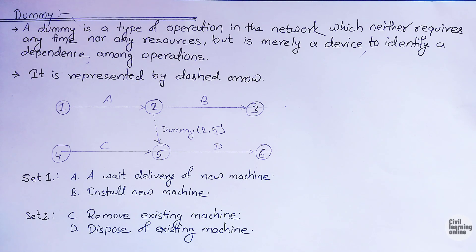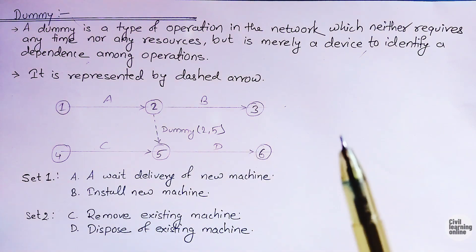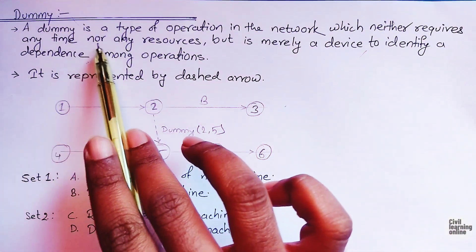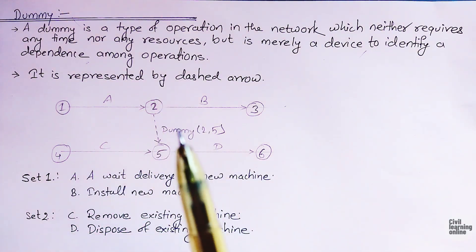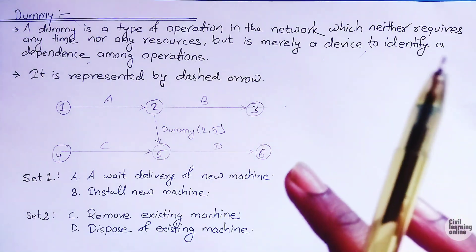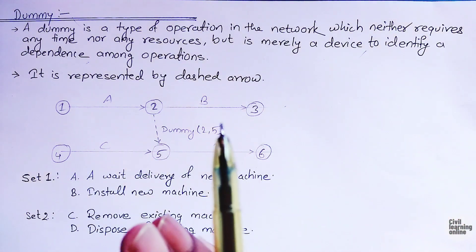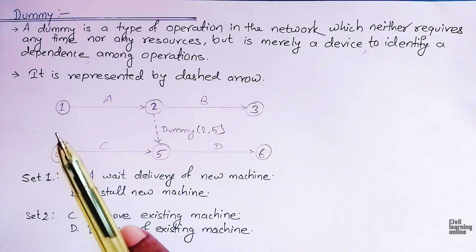In this lecture we will discuss about dummy activities in detail. In the previous video I discussed the definition of dummy activity and some basic concepts. Here we will read about it in detail. A dummy is a type of operation in the network which neither requires any time nor any resources, but is merely a device to identify a dependence among operations.